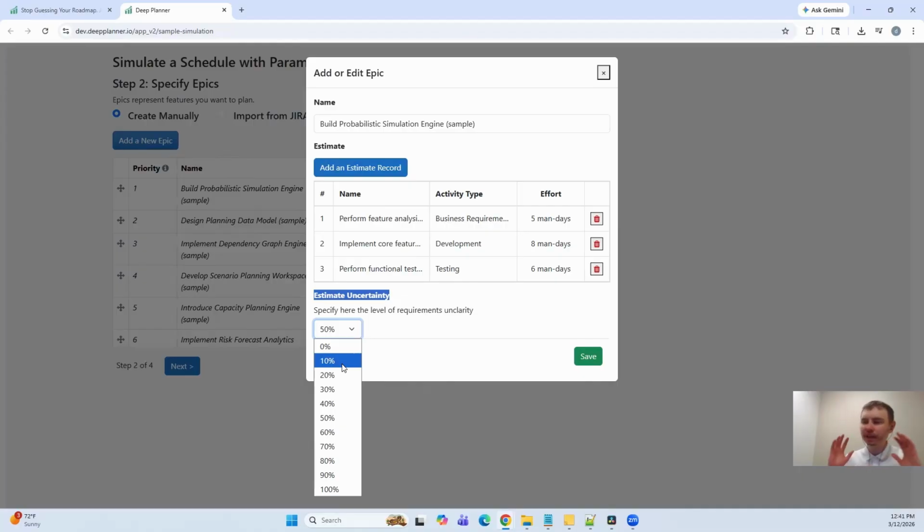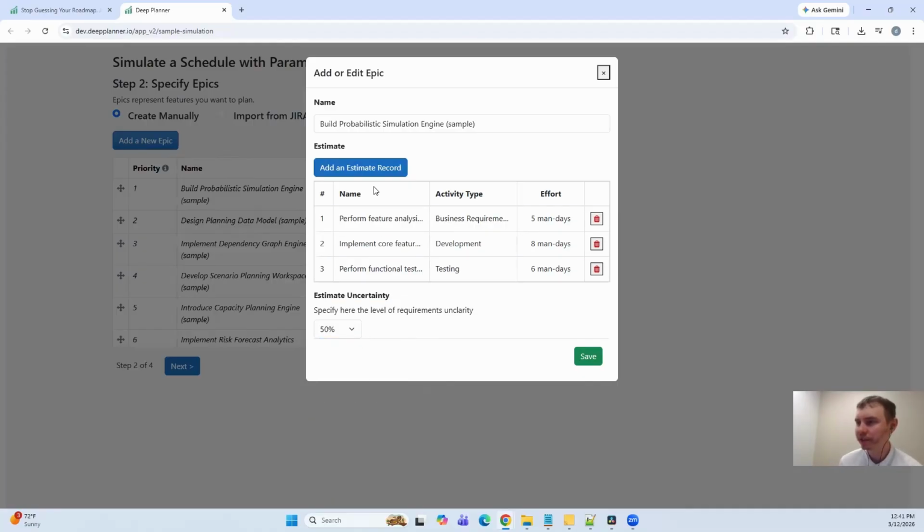But this is where a lot of details of the ticket are defined, like user interface, specific business details about the ticket, maybe behavior things, right? So usually it's somewhere in the middle, like 50, 60% for a ticket with high level requirements defined, right? So we can see, once we define the estimate and the uncertainty, that these factors will affect our roadmap a lot when we also apply risks to the delivery dates, right?